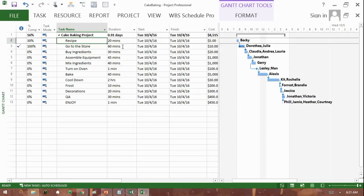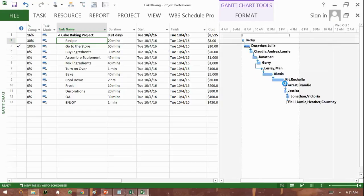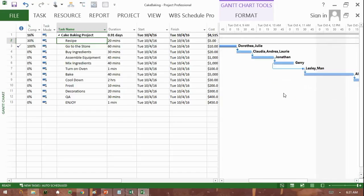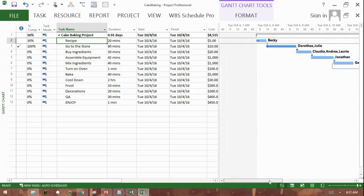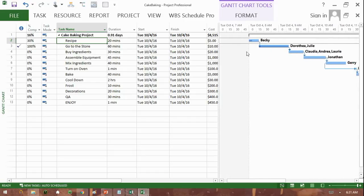We could use different relationships when sequencing activities. There could be a relationship called a finish to start, for example, which means one task must finish before another starts. If you look carefully on this side of the screen, you will see an example of this.